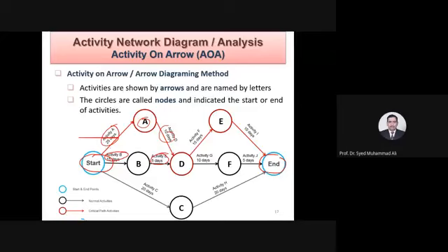For example, I'm spending 25 days. Marla is, by the way, small. Let's say it's one canal. I'm just referring to 25 days. We are doing manual excavation. So let's assume there is a basement also, and we are taking 25 days of excavation, and it gets completed. Then 15 days, actually, we have ordered the steel, and the steel fixer has started working on straightening the bar, cutting the bar, bending the bar, because in the foundation we are going to use steel. It will take 15 days.